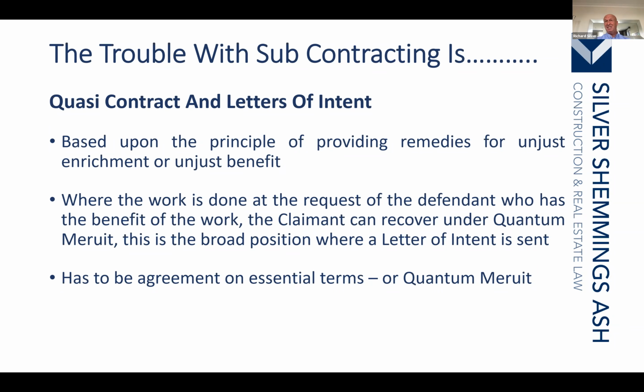There is no completion date. There is no damages for delay. And indeed, they can't even charge you for the cost of repair more often than not. What they have to do is to do an abatement and not pay you for works that are not properly carried out.